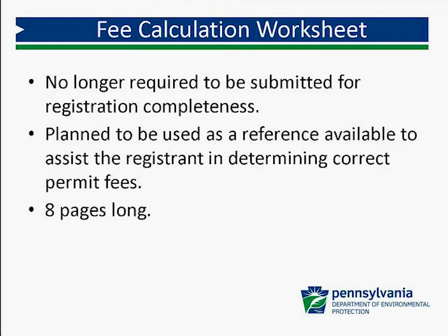The Bog Turtle screening form, which has been a form required in the past, will no longer be used, and it has been eliminated. U.S. Fish and Wildlife has made an effort to enter what data they can on bog turtle to the PA Explorer PNDI reporting system. It's my understanding that not all that information is in there, and we are still working with the Corps and U.S. Fish and Wildlife to iron out the details due to the elimination of this form.